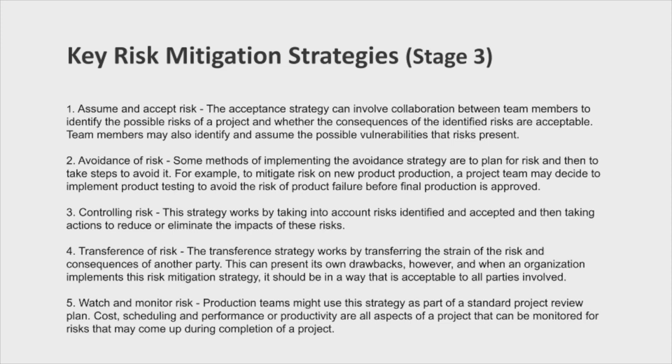The thing is, when we buy insurance, if we do have an accident, that company that we purchased the insurance from assumes a risk for us. That's what's known as transferring the risk. Again, transferring a risk can be expensive. Insurance gets expensive, for example, so we need to work with it in terms of this issue of transferring. We need to work to ensure that all of the other things are in place too, such as controlling risk or potentially avoiding risk.